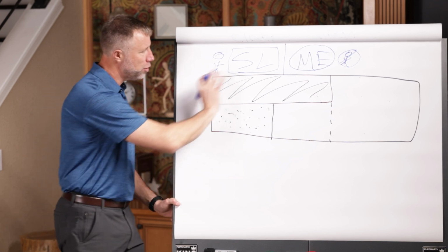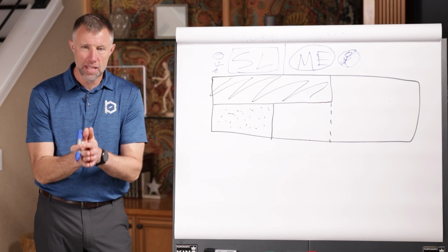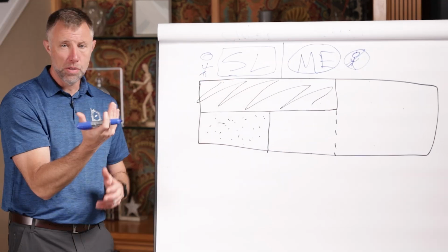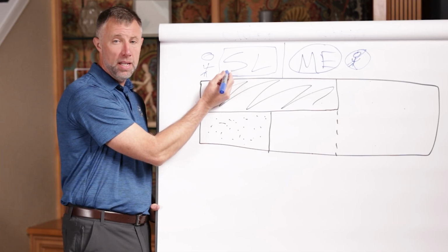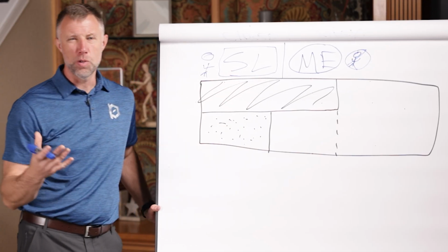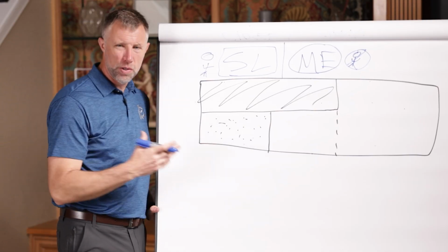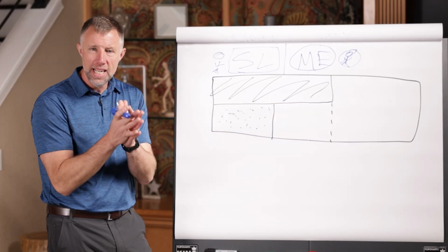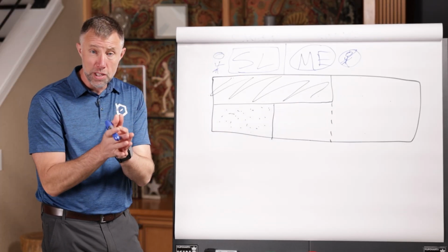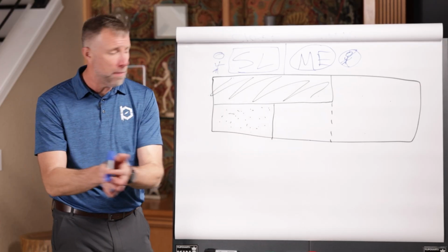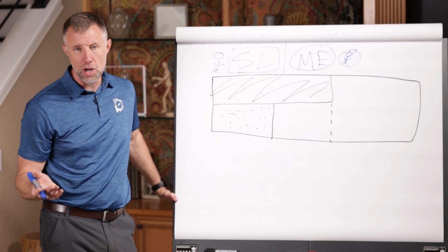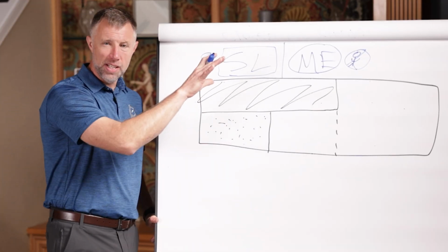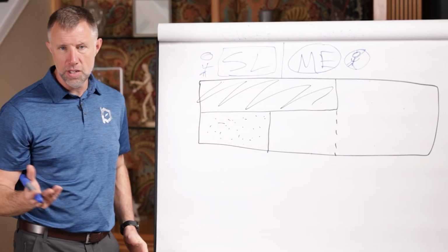All right? So if we've got two sides, basically, any money that is applied to hiring a sub crew, some sort of sub bid package, whatever you might have, that's going to be on the people side. And then your labor might be more seasonal. Some of you are like, wait, shouldn't these go together? Sometimes they do. You can just look at it. So anytime you're going to put an expense towards people on a job, that's going to be the SL side of our SLME methodology and understanding our cost of goods. The M and E side is materials and equipment. Again, these are the non-people.